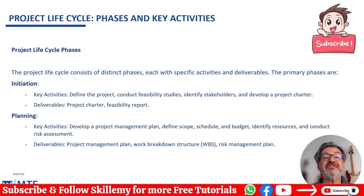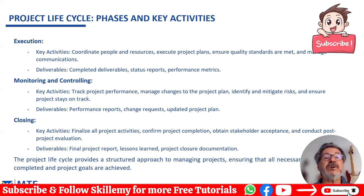Planning. Key activities: develop a project management plan, define scope, schedule, and budget, identify resources, and conduct risk assessment. What are the deliverables? The project management plan, a work breakdown structure, also known as WBS, and the risk management plan. Next, after planning, we have execution. The key activities are to coordinate people and resources, execute project plans, ensure quality standards are met, and manage communications. Deliverables: completed deliverables, status reports, and performance metrics.